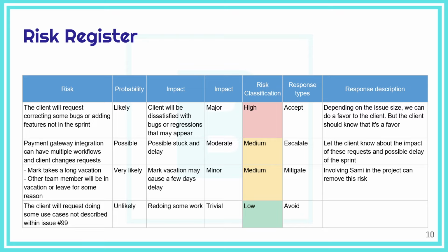And we explained to you how to calculate the score, in order to know whether to respond to the risk or just keep monitoring it. Because if your risk score is less than the threshold, then it's not really necessary to respond to it, because it would just consume company resources and it's not of that big importance.